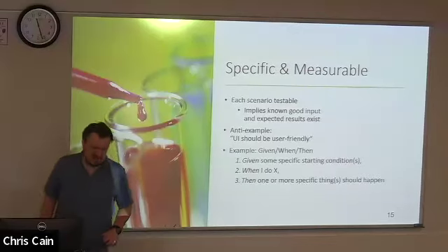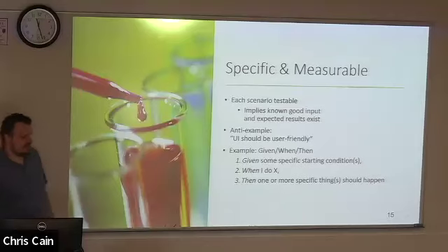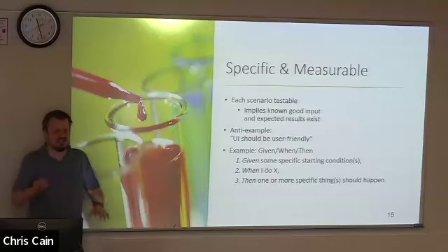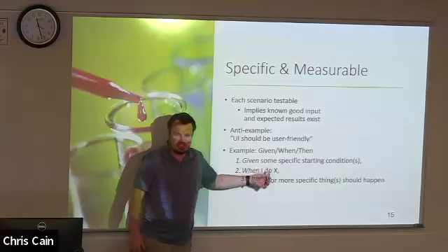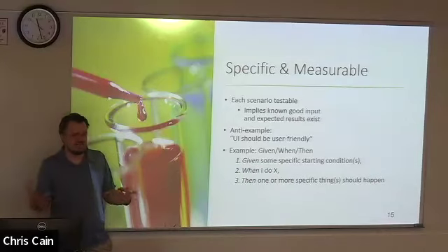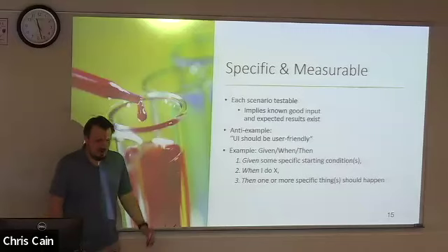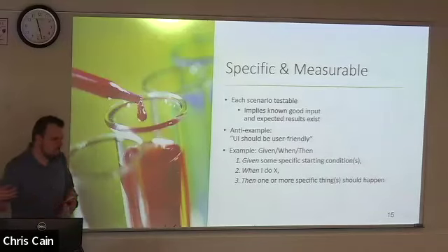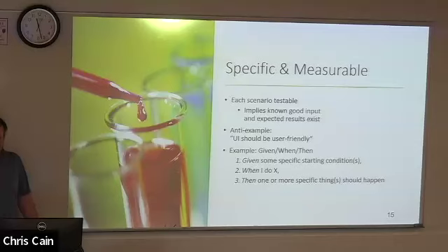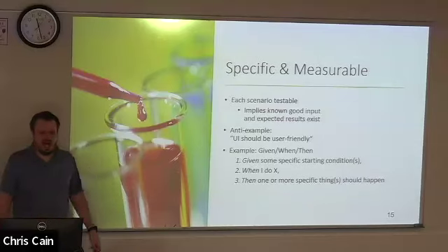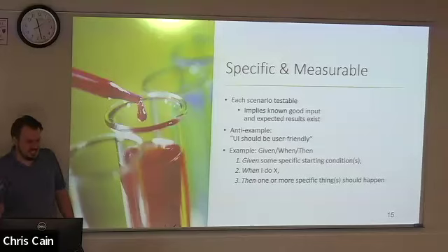The scenario part of this is going to be written using given, when, then terminology. So we have the user stories as a I want to, so that. That's a user story. A scenario is given, when, then. Given some specific starting conditions, so this lays out kind of the conditional of when does this scenario apply. Given that I am on this particular website page, when I take some action, when I click on this link, then I arrive on this landing page and see this.